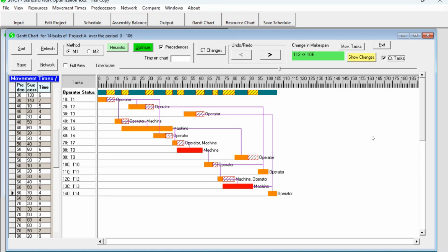So if you want to reduce the makespan further, you have to reduce the duration of one of them. In this schedule, this is like a project, with tasks, dependency relations, and resource requirements. This is a tiny project. These are the critical tasks in this tiny project, and you can see that this machine operation T8 is not a critical task.